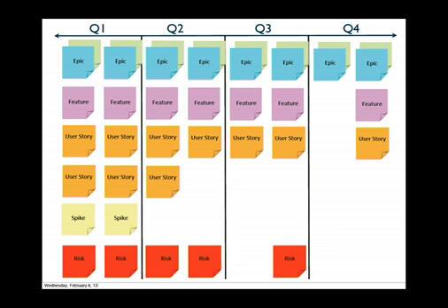Just to give you guys another quick story. I was working with a team last summer, and we implemented all this stuff. And just like a lot of teams, in their first release, they got everything broken down. They had understood their upcoming release, and they pulled some spikes forward. Well, then the work that was in the current quarter got bigger than they had expected. And the first thing they wanted to pull out was this notion of the release level spikes.